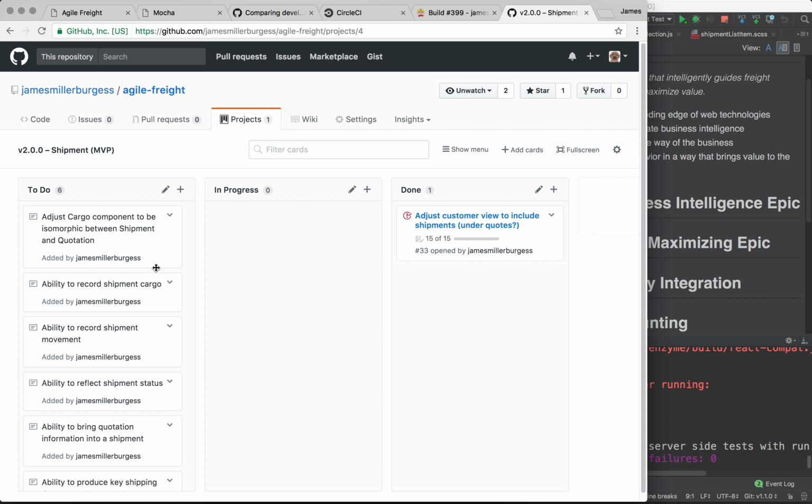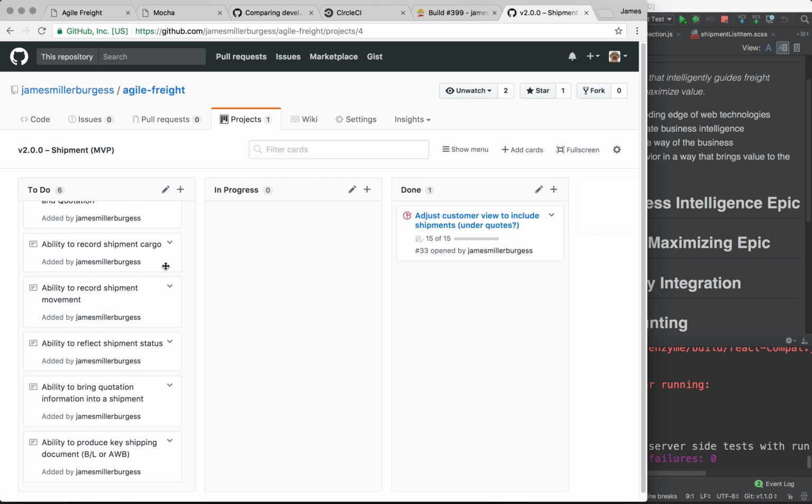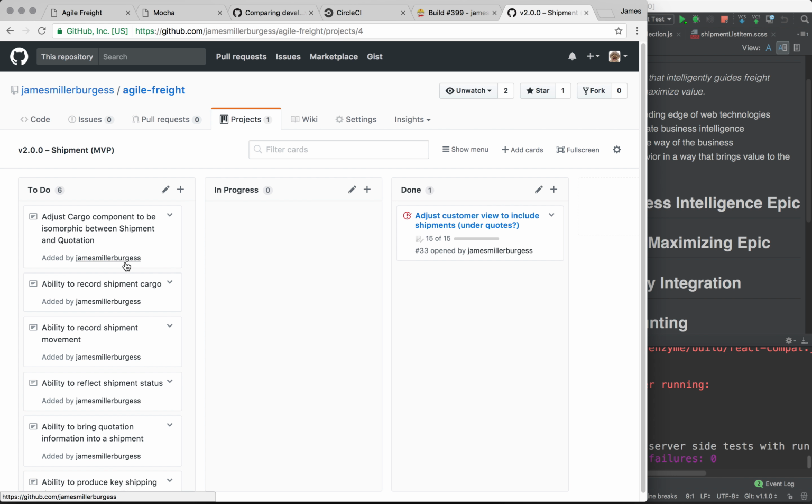And so he would field questions like, why don't you do X, Y, or Z first? And he could take that. So the list that he's presented is not fixed. He could change his mind, or she could change her mind. But the ultimate decision rests with the product owner. So the feedback given should be suggestions or questions, not really demands, because the product owner retains that responsibility, regardless of the rank of the stakeholders involved, even if it's the CEO.